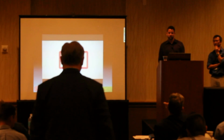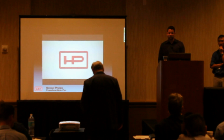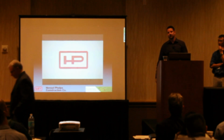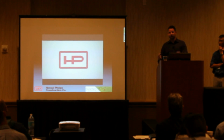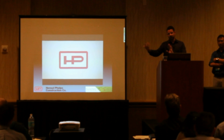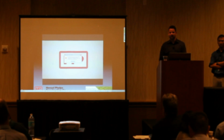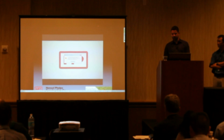On your drywall or your outside, how did you realize? As that video was playing, they tracked the starting points. You could see when the silver started, which represented the metal studs. You could see that at one point there were three sequences going, so it made them realize that they needed a third plaster crew in order to do that.